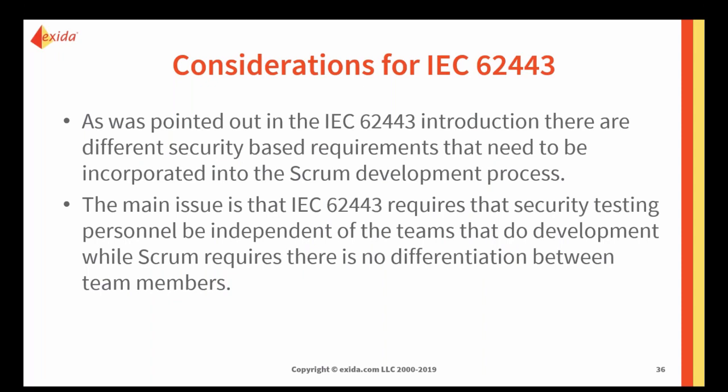One of the main issues is that 62443 requires that security testing personnel are independent of the teams doing development. And the problem is that Scrum requires there's no differentiation between team members. Now, that almost never really happens. There's always somebody who's the architect in the group, and somebody who's the implementer. But Scrum itself, if you adhere to the process, states that there's absolutely no differentiation. 62443 requires a differentiation. So that's one of the main points that has to be addressed,